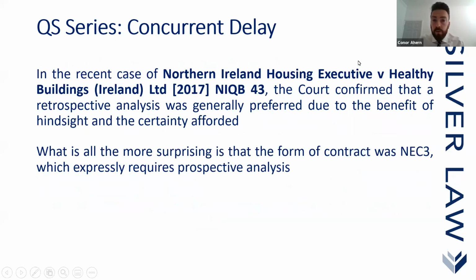Okay, in the recent case of Northern Ireland Housing Executive versus Healthy Buildings Ireland, the court confirmed that a retrospective analysis was generally preferred due to the benefit of hindsight and the certainty afforded. What is all the more surprising in this case is that the form of contract was NEC, which expressly requires prospective analysis. So it's quite interesting from that point of view, because NEC obviously tries to predict, it looks to be proactive, certainly more proactive than the JCT forms, where they're constantly looking for updated programs in order to anticipate the extent of the overall delay.